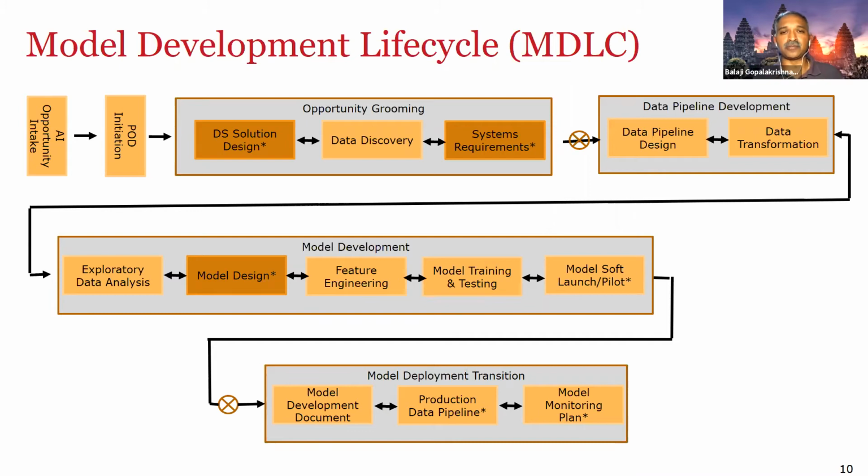The amount, the person who's writing it, which bank it's being written to, and which bank it's written from, and all of those things, right? But the signature aspect of it, whether it's a legitimate signature or not, is a separate project that can be spun off as an image recognition model. And then the score from that model can be used as part of the overall check fraud, right? So those are some of the things that you have to recognize upfront, so that you can plan properly.